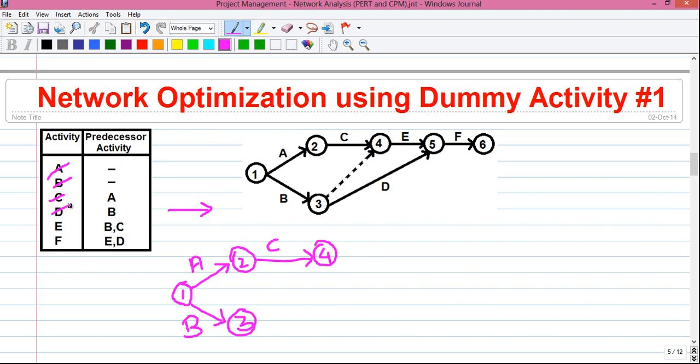Next, activity D. It has the predecessor activity of B. So it will start from event 3.